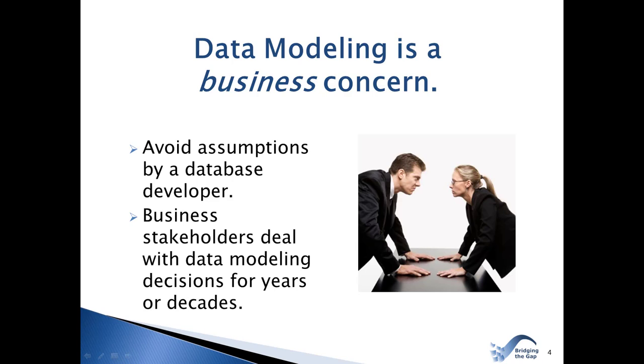Finally, during user acceptance testing, we learned that each order must be associated with a customer service clerk so that we can report on productivity metrics. Although a relatively simple change, famous last words, updating the database and checkout functionality delays the implementation of the project.